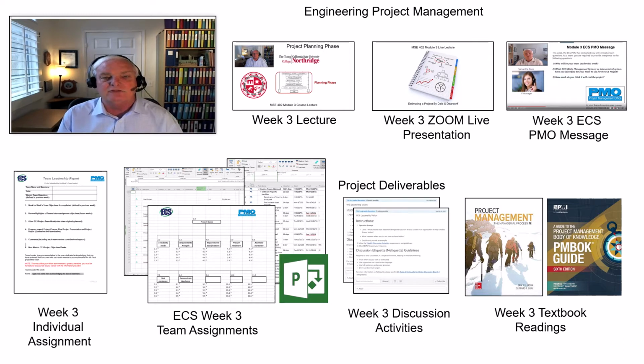You'll lay out the start and the finish milestones, then the major components of the work breakdown structure, and then the tasks and subtasks. You can lay in milestones. You want to put the hierarchical area together, and you're going to see that once you get this structure put in place, it's going to give you the opportunity to create your initial Gantt chart. You'll be able to see the Gantt chart, the network diagram.